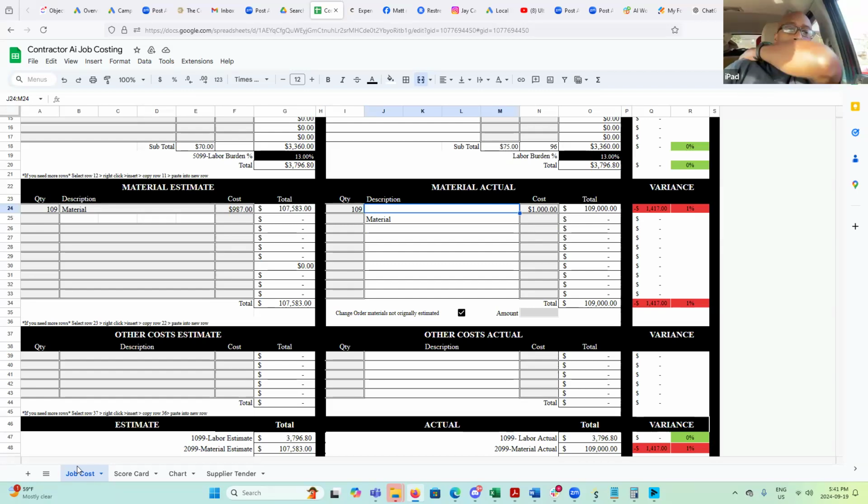I have this much volume in this, this much volume in that, and you decide if you're going to give them the next 3 months of your work. This is when you start to grow, but you can do it at a smaller scale too. Common items, things you should inventory. All of this data is right there for your taking. So what I do with my suppliers is say, this is how much you can count on me for this quarter for, say, steel. We just ordered